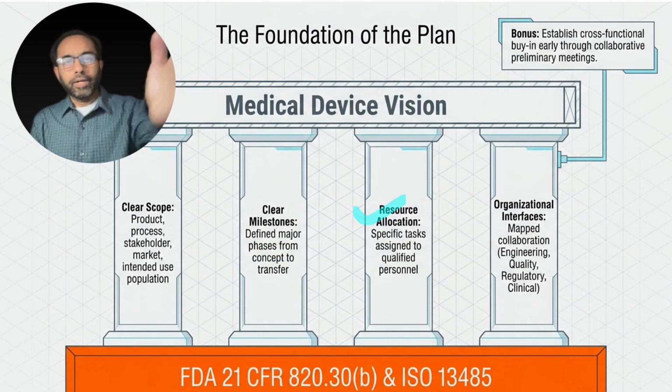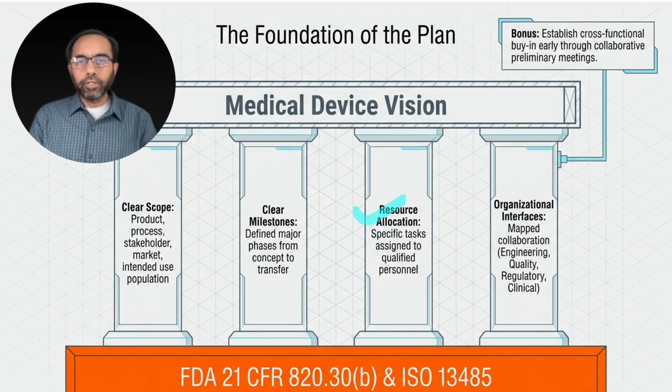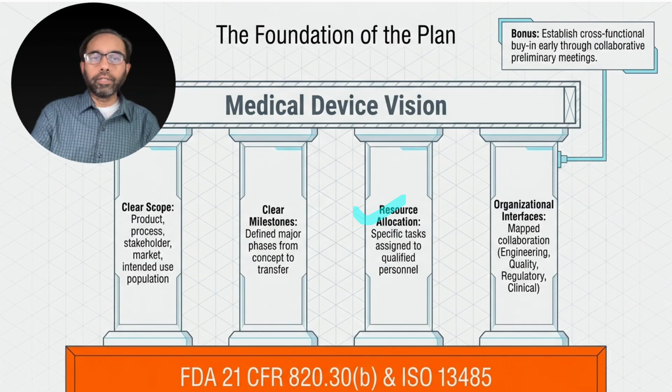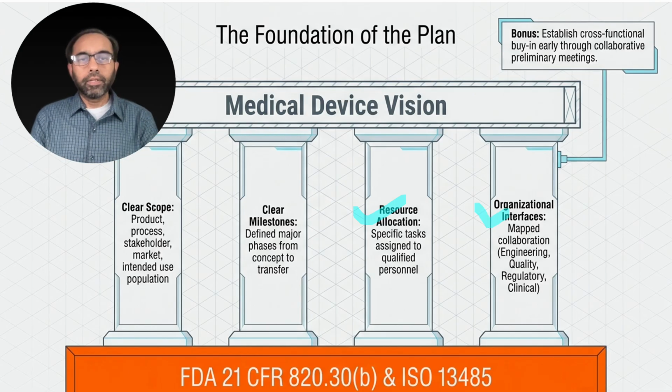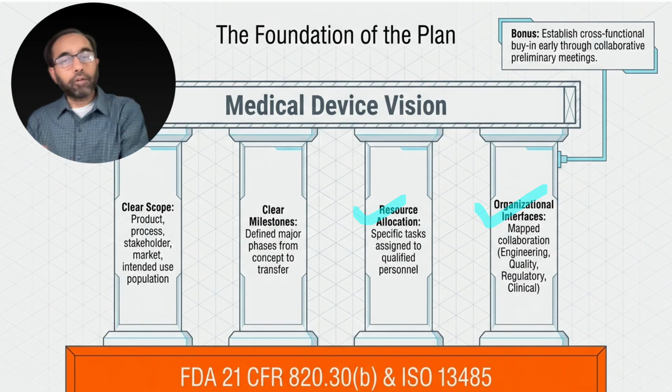Organizational interface is your next pillar. Map how engineering, quality, regulatory, and clinical teams will collaborate. Specify how often you will meet, which communication method you will use, and the expected outcome.